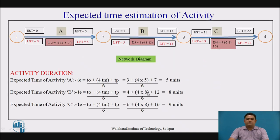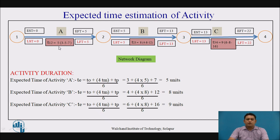For expected time estimation of the activities, using the formula seen earlier, for activities A, B, and C, the three time estimates are 3, 5, 7 respectively — where 3 is the optimistic time, 5 is the most likely time, and 7 is the pessimistic time. The expected time values obtained are 5, 8, and 9 for each activity. With these expected times, we calculate the project duration.